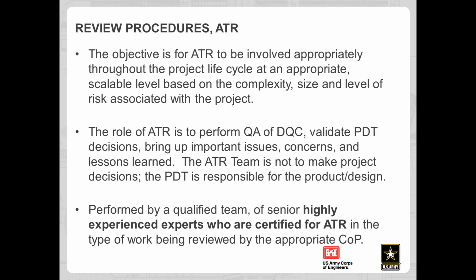So here the objective for ATR is to get them involved early in the process, similar to the DQC. As we stated earlier, the DQC lead identifies a key issue. You bring in the ATR team. At this point, we define the roles here. The ATR team is to validate, or to make sure that DQC has occurred. They're to bring up important issues, concerns, and lessons learned. But the ATR team is not to make project decisions. That's the PDT's role.